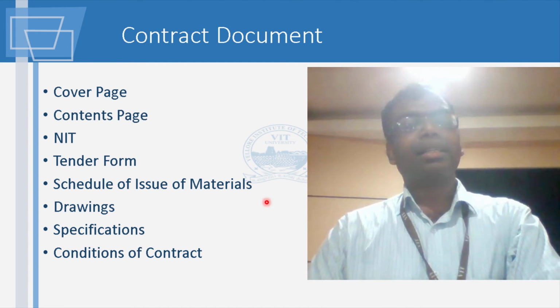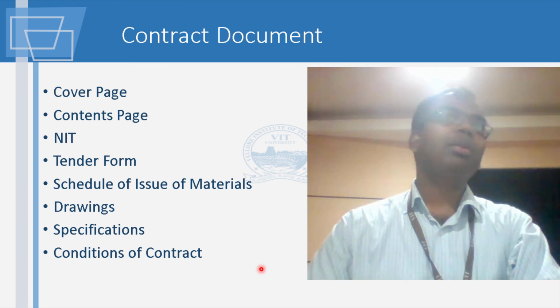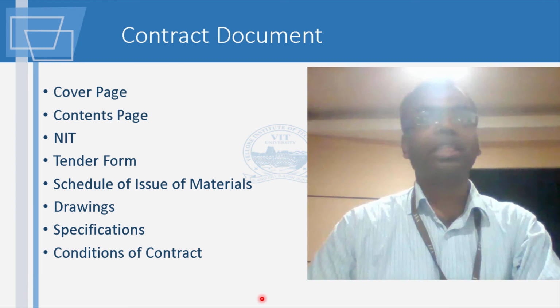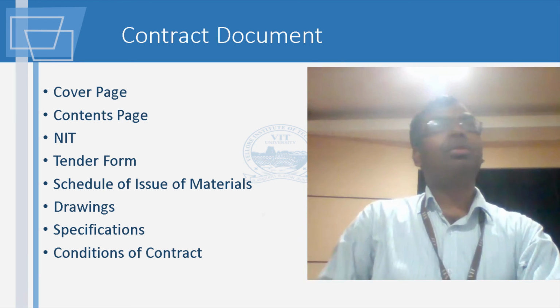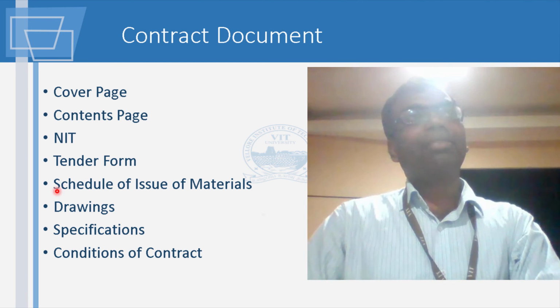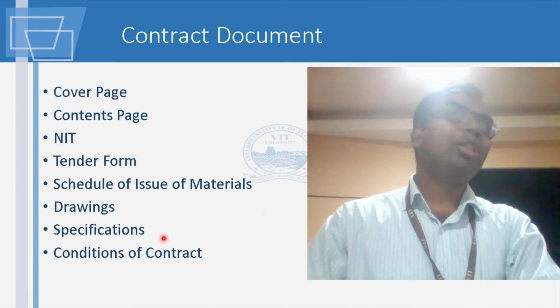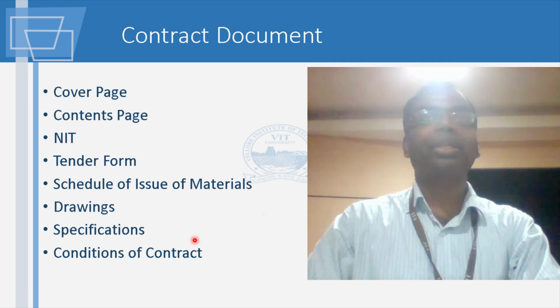Then the form of the tender. There will be a lot of things which have to be given in the mandatory order. What is the security, what is the previous work which you have done? It will all be in a sequence. So you have to compulsorily adhere to that form only. In fact, in many cases, people will specify the font size, and so many other things which we normally don't think about in India.